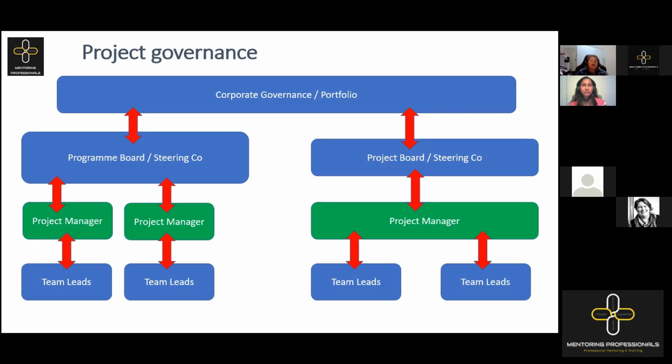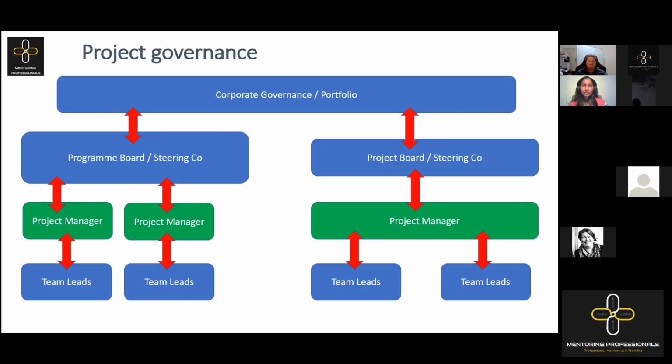And we also have our, which ones did I say so far? Scope, risk. Did I say risk? I lost track of myself then. So we should have 6 there. We should have time, cost, quality, risks, benefit, and scope in the Prince 2 world. And when we talk about tolerances, that is a plus or minus. So when we do our estimating, we would actually have a plus or minus on our time and our cost regarding our actual plan itself. The actual tolerance itself is in fact a project control.